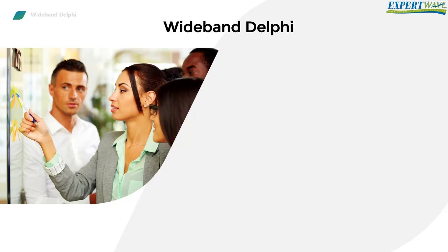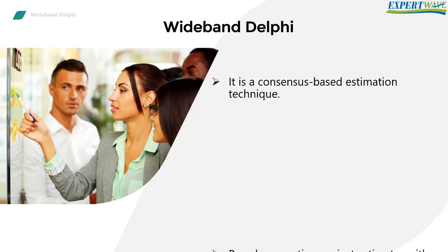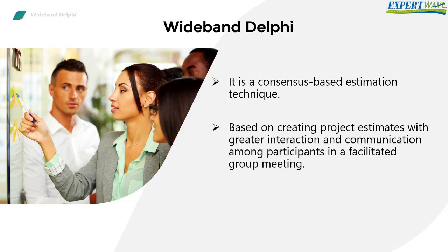Then the Wideband Delphi technique, which is a consensus-based estimation technique where the project estimates are created through collaboration between the meeting participants with the aid of a facilitator.